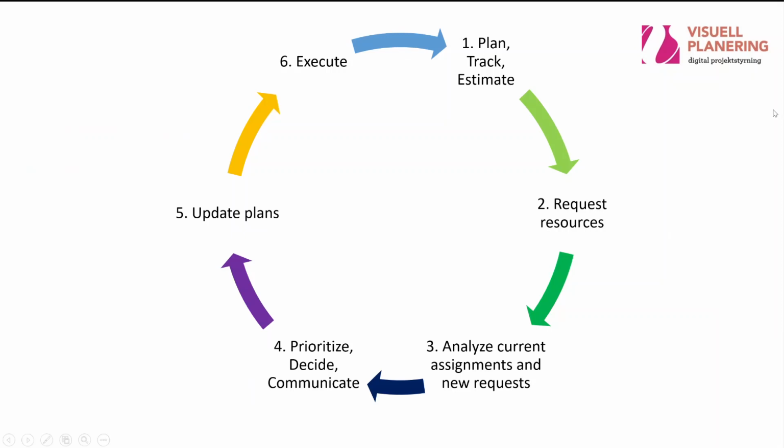And this is typically, in most organizations, in my experience, a monthly process. But it's important to keep it a process, because if you get this ad hoc in the middle of the month, you just change everything, then the confidence in the process will decline, and you will see that people won't be interested in actually updating the data, because it's easier to just ask and get an ad hoc decision.